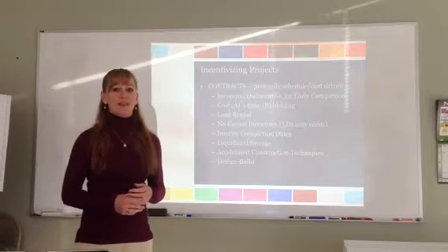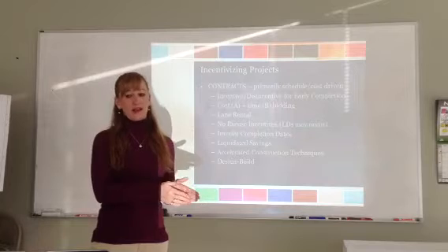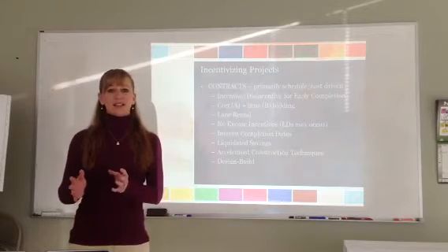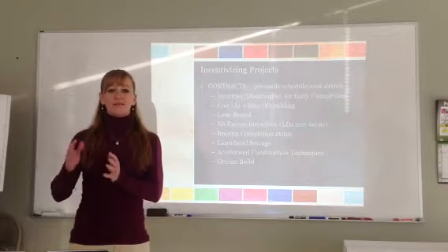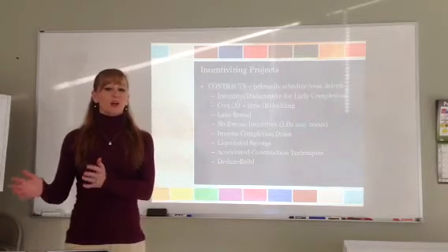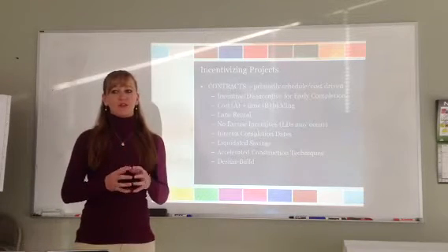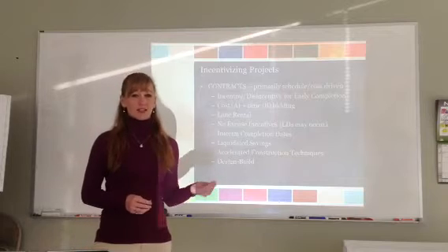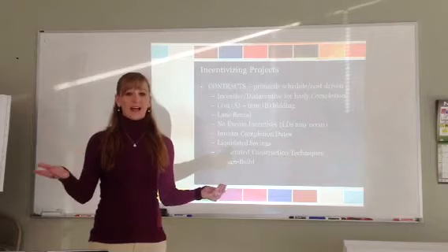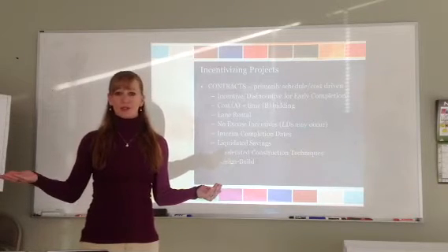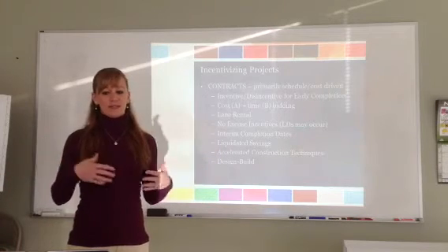Another way is looking at the best value for the contract. Not only looking at the cost at bid time, but looking at the calendar days that subcontractor has scheduled for that project and multiplying it by the owner's actual cost per day and taking that into play together to give you your best value. That means not necessarily the low guy will win the project because he may be low in cost but high in calendar days, and when you multiply that by the owner's values that he would associate with the cost per day, that would be different.